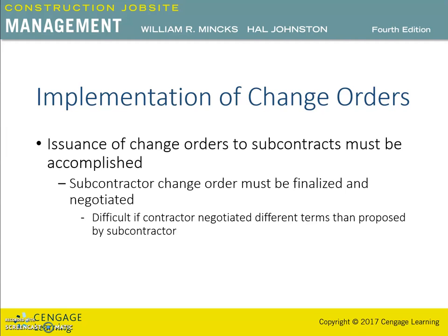If the contractor has asked for cost and time input from the subcontractor at each negotiation stage, from the original change order proposal to the finalized change order completion, then a finalized subcontract change order will not be hard to accomplish. This becomes a difficult process if the contractor has negotiated different terms with the owner than proposed by the contractors.